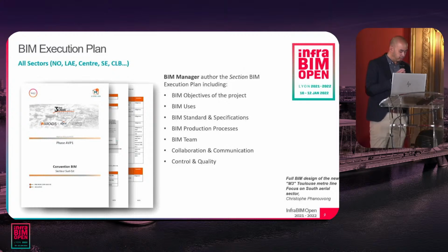We author the BIM execution plan. We have to identify the different BIM contributors, etc. And we have to organize the different BIM reviews that we have on the project, and to verify also all the different advancement on the project, and to verify the global coherence between all the different deliveries that we have.